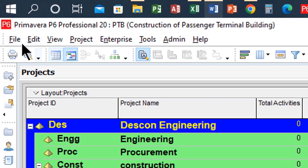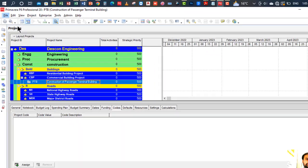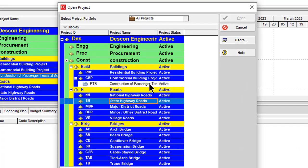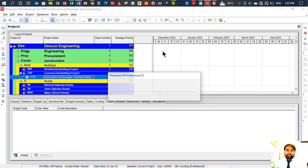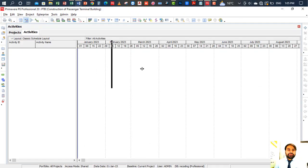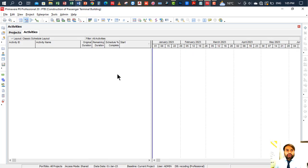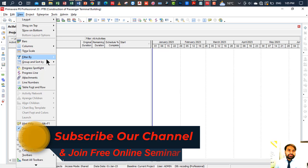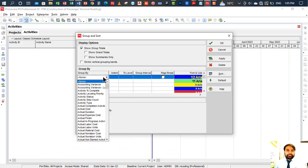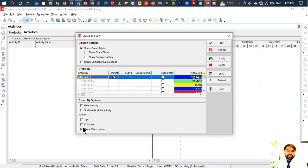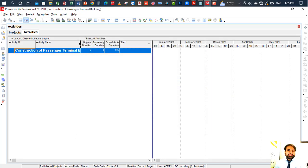To open the project file, go to File, click Open. You can see your project file listed under Commercial Building — double-click it or select it and click Open. However, it may not be showing in the Gantt chart window. To display it there, go to View, then Group and Sort. In the Group By field, select WBS — click the blue cell dropdown, press W on the keyboard, click WBS, then click OK. Now you can see your project 'Construction of Passenger Terminal Building' displayed.